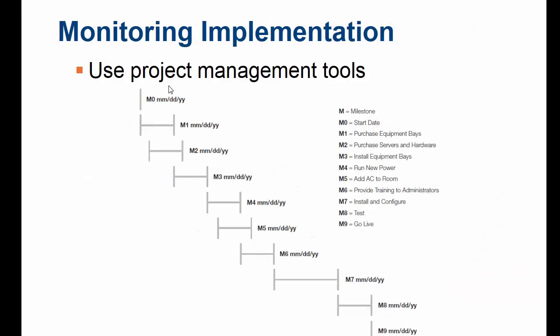And then you want to monitor the implementation by using the project management tools, and you can set milestones in there. Okay, so our start date is going to be here, but by so and so time we want to purchase these equipment bays, and then after we purchase the equipment bays, we want to purchase the server hardware. So you give specific timelines for that, and you want to meet those critical points.